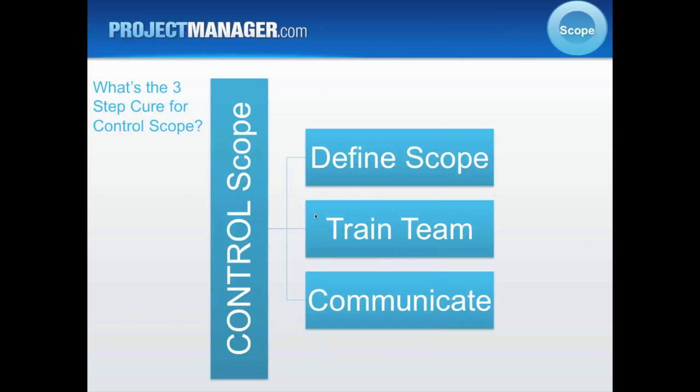You can either take the request yourself, but typically in working with client organizations, they like those requests to come through them. If you think of a change control board, you're the project manager on the change control board, as well as the others. Remember the stakeholders, those are the people authorized to evaluate and approve the changes. Typically if different business units, vendor partners or groups are represented, those representatives want the request from their business unit or organization to come to them first, because they know the overall scope of the project. They're in line with the executive committee on why this project is actually being done.